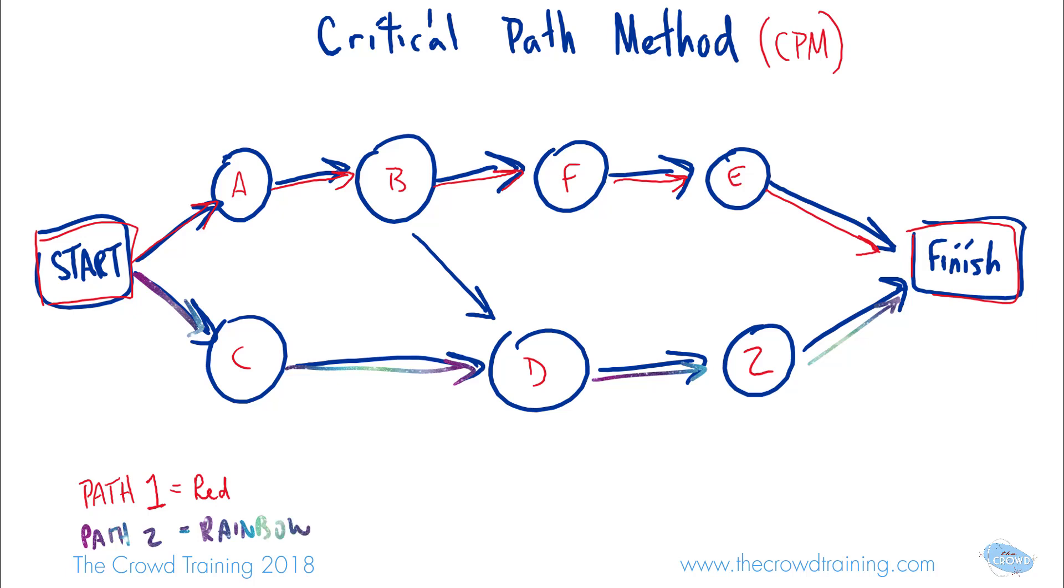Then number three, I'll pick one more color here. Maybe I'll make it a highlight so it stands out. We're going from A to B, just like we did in the first path, but in this one, we're going to go down to D, then to Z, then to finish. So that would be our path number three.